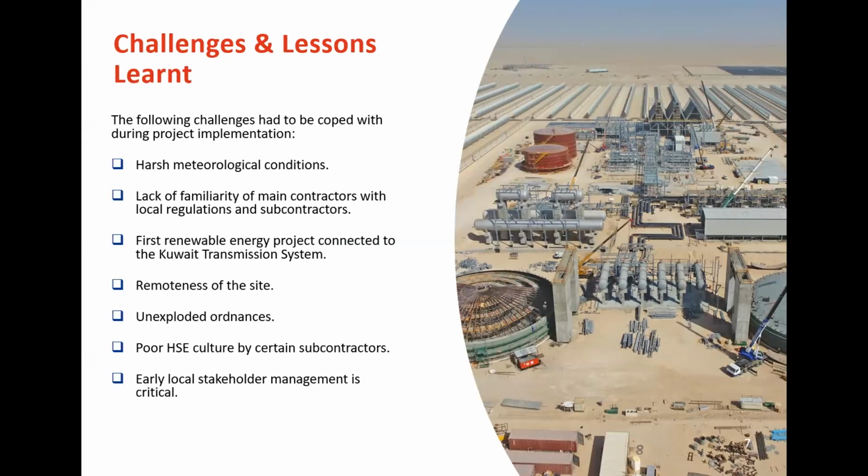So a number of authorities had to approve at some point or another, either before starting construction or once the project had been commissioned. So a number of approvals were required, and the early engagement is really key to make sure that it's not impacting the project.